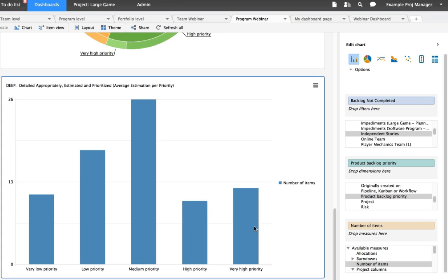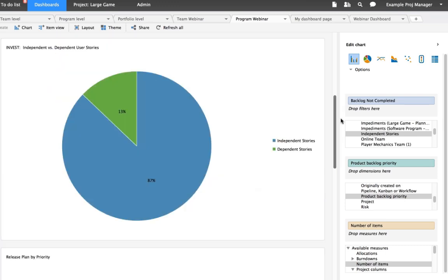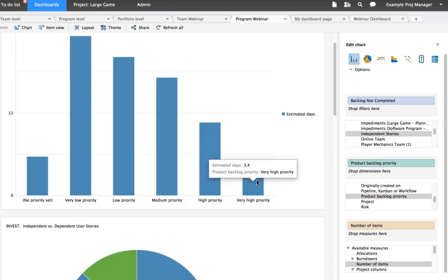One would show all user stories from one estimated ideal day to 3, another from 4 to maybe 7, and a third from 7 up to 20, which would give me an indicator of how many at each priority level are falling into each of those estimate size ranges, an even more powerful way to break this down into detail to see where that average is coming from.